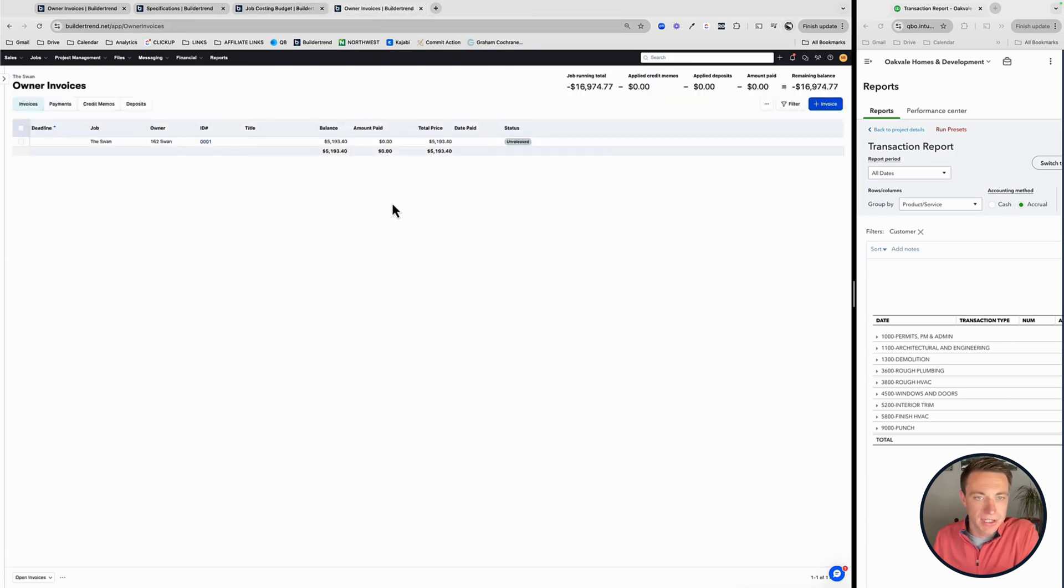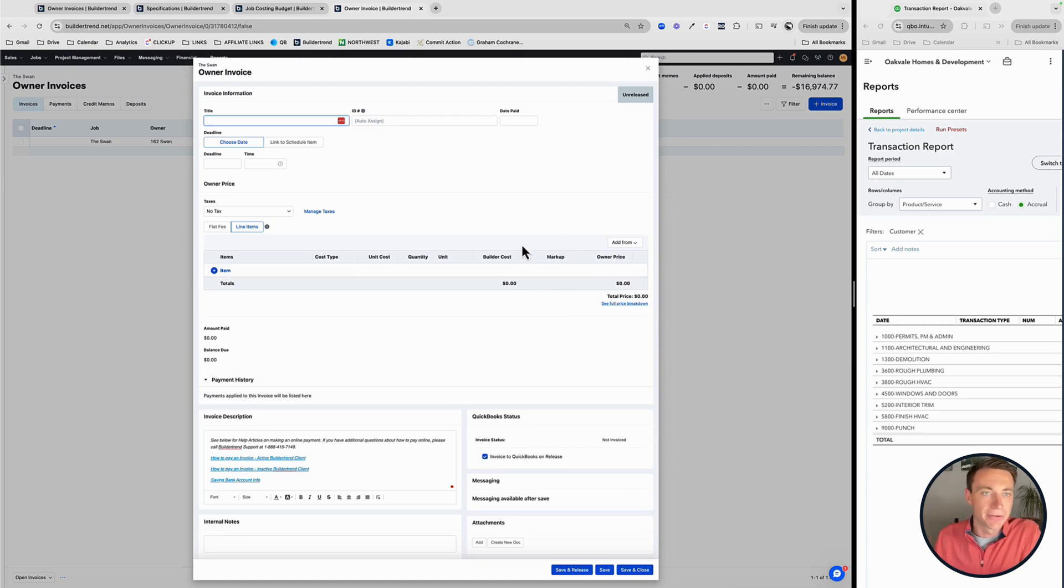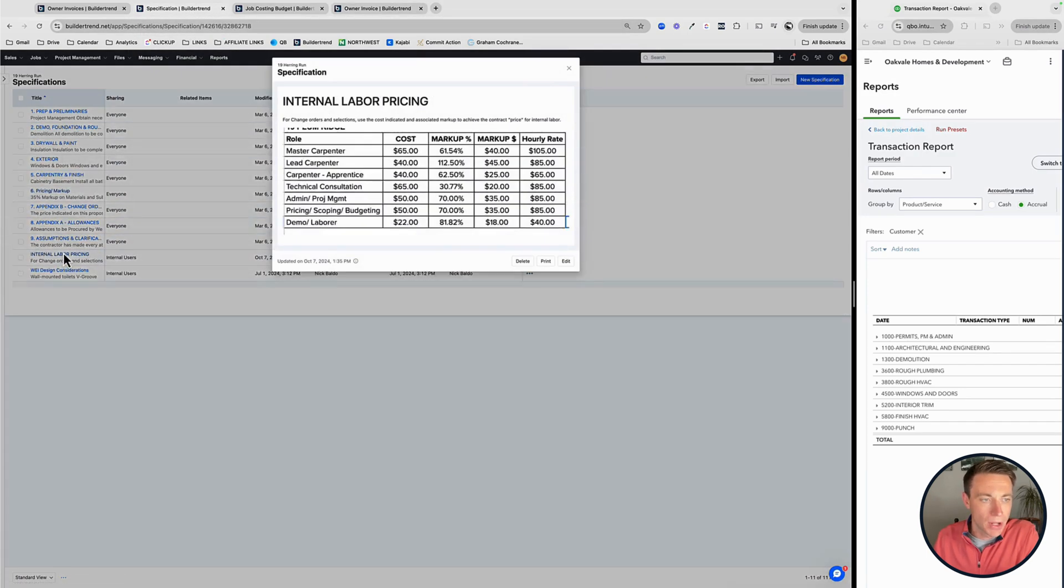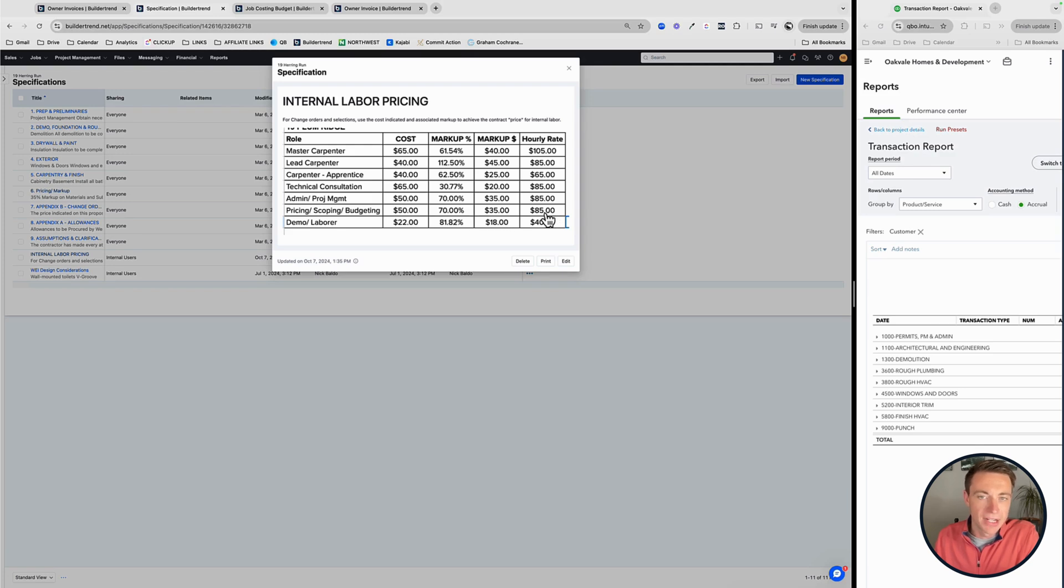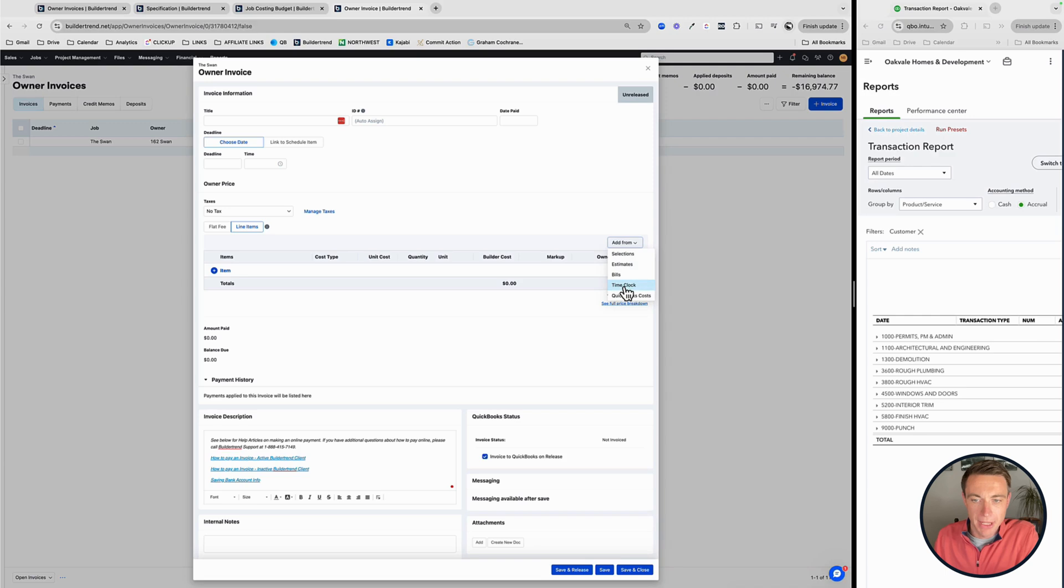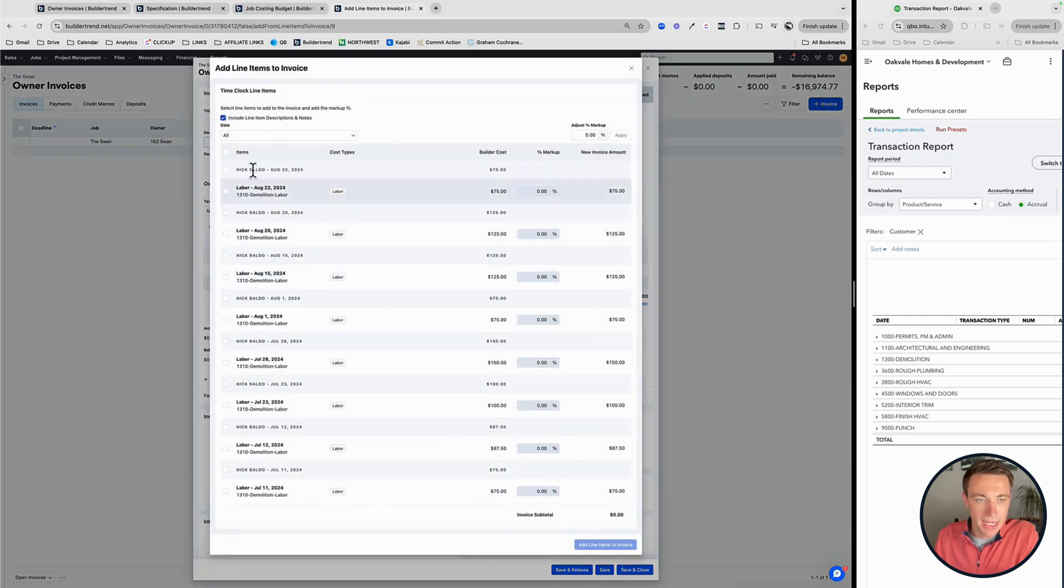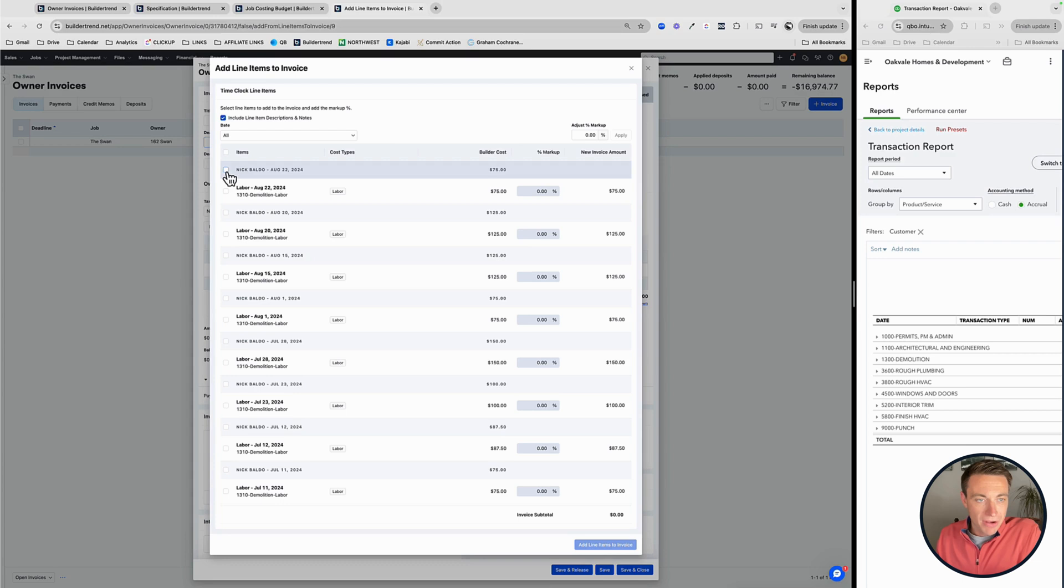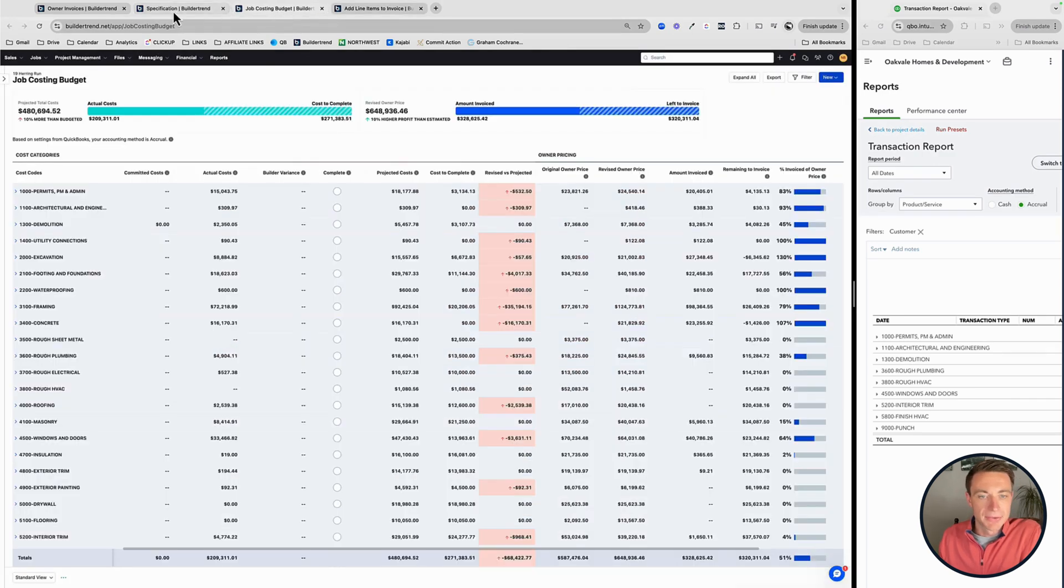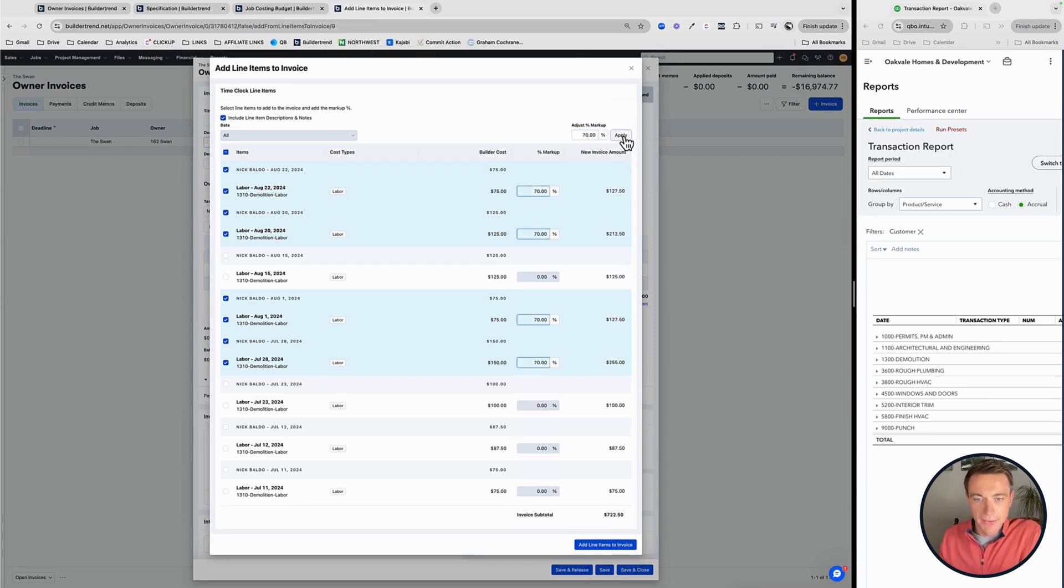Let's go to this other invoice that I'm going to do here. In this case, I just have my own time here. So you can see this and I put myself in at a $50 an hour rate. Now at a $50 an hour cost rate to me, what does that mean for my price? Well, I need to be some kind of role. So let's say that I was a, in this case, I'm a pricing, scoping, budgeting person, right? So I'm going to cost $50. I'm going to mark myself up 70% to get myself to an $85 hourly rate. I'm just going to use that example here. So I go to this invoice. I'm going to add from my time clock here and here is all of my time. Now you can see I'm doing some demos, some other things. And what you would probably do is if you have a couple different resources, I would grab all that are the same resource. So this is all, let's just pretend for a second. This is all the Nick stuff. And we had that, I think it was 70%. markup there. So let's do 70% there. Apply.